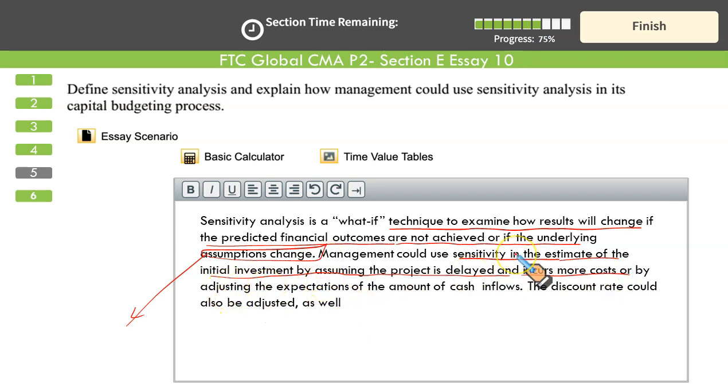You can change the variables up and downwards, and you can see the impact of all these variables changing simultaneously by incorporating the numbers in a computer simulation. The impact of the changing variables upon the NPV can be seen in real time in the computer analysis. So you can use sensitivity analysis in any way: delay the project, increase or decrease a variable, and see how they affect the NPV of the project. In any line you can explain the idea.